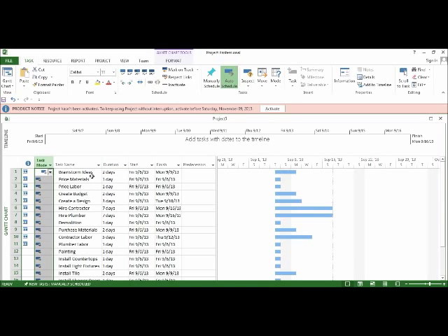So what that means is, first I have to brainstorm my ideas before I can price materials, because if I don't know what ideas we have for the bathroom, what type of sinks we wanted to get, what type of towel we wanted to use, I would not be able to price the materials. So the way that I do that is I click on brainstorm ideas, hold down control, and then click price materials, because pricing the materials is going to come after I brainstorm the ideas.